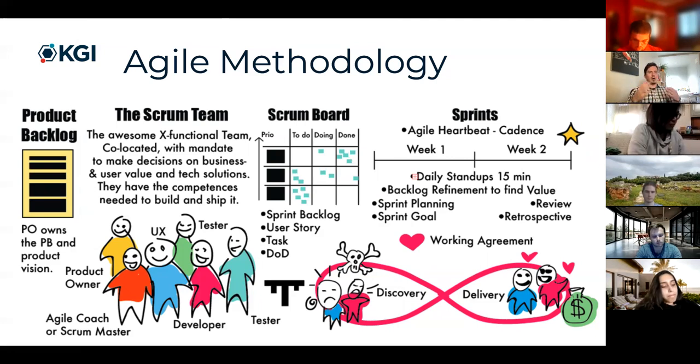And the product owner will own the product backlog, and they'll also rank it. So you'll have a meeting within your team, and you'll figure out which are the highest priority. That's going to be based off of what the customer is telling me, as well as what's doable. Sometimes things are really needed, but maybe you have to do a bunch of things before you even get to that point. And then they'll use that as the feeder into the Agile iterations.